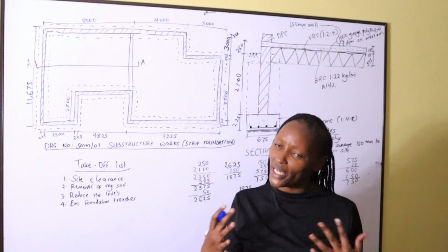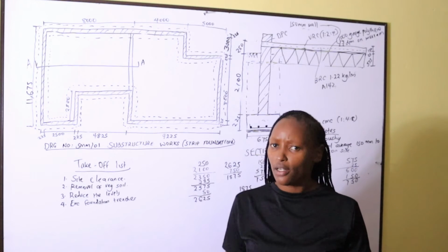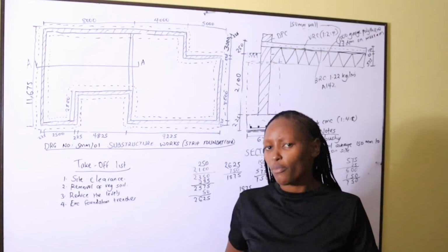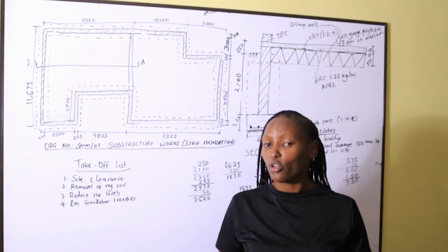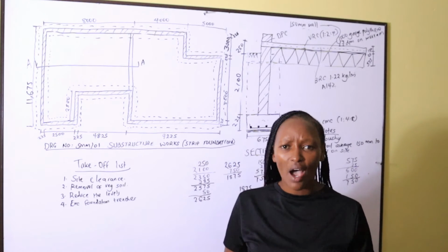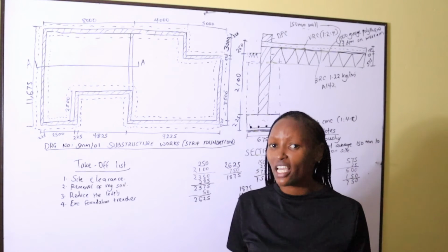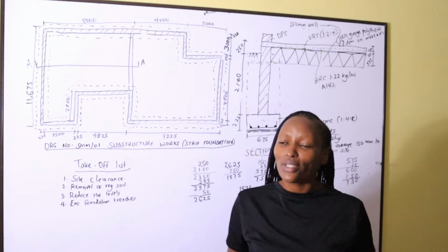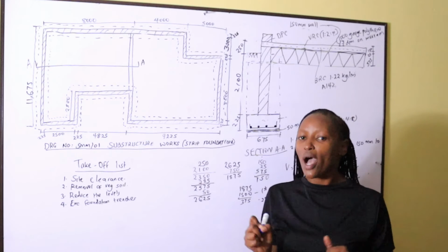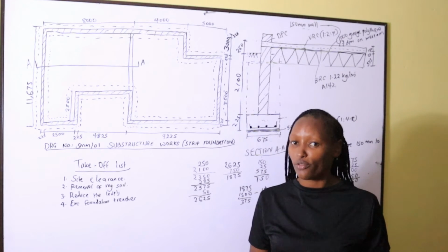Provisional is in the meantime before we go to know the extent amount of work. You see, a bill of quantity is that document that tells us the cost of the building before we get to site. And tenders and contracts are entered into using the bill of quantity. So everything has to have a cost implication in the bill of quantities, whether we can measure it accurately or not. So that sum of money that we usually give in the bill of quantities for works that the full extent cannot be measured from the drawings is called a provisional sum.